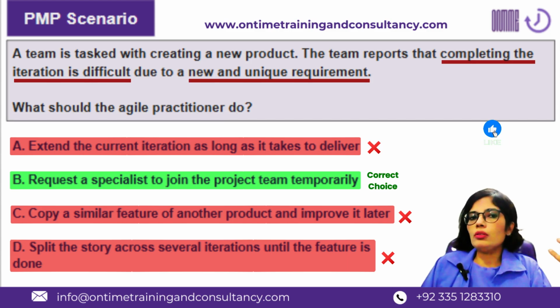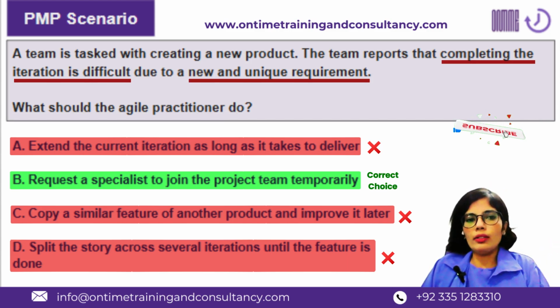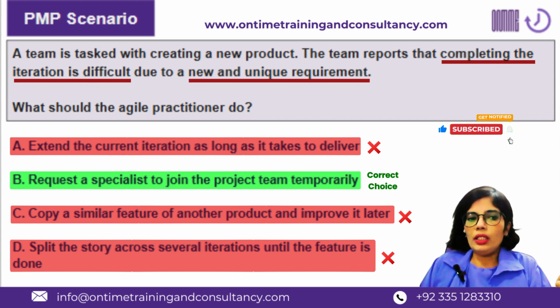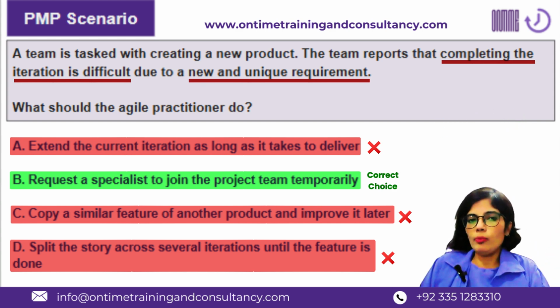in that case, the formal onboarding process would be needed, and budgeting and costing and approvals and everything would be needed. But for the time being, it's just getting help from some other team member or some other resource from another team. And this is a very, very common practice, especially when you are working in a matrix type of organization, a matrix type of organizational structure.